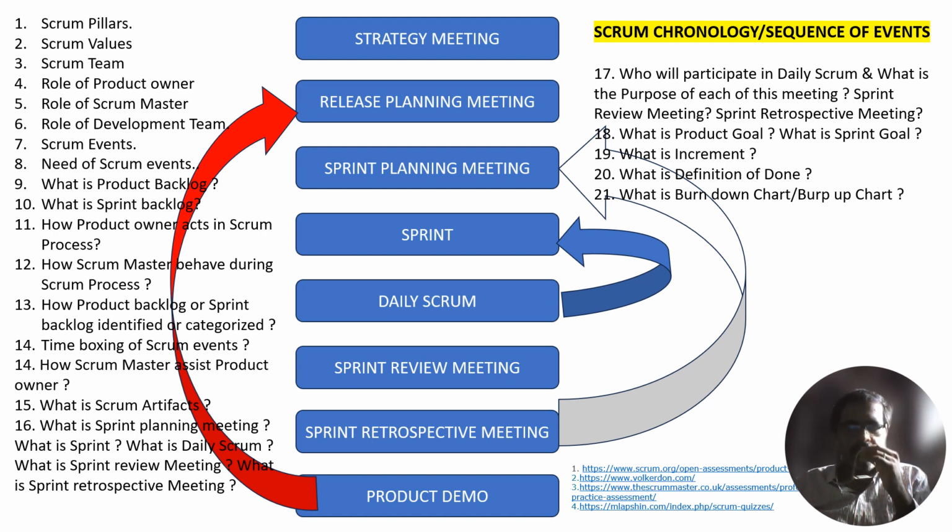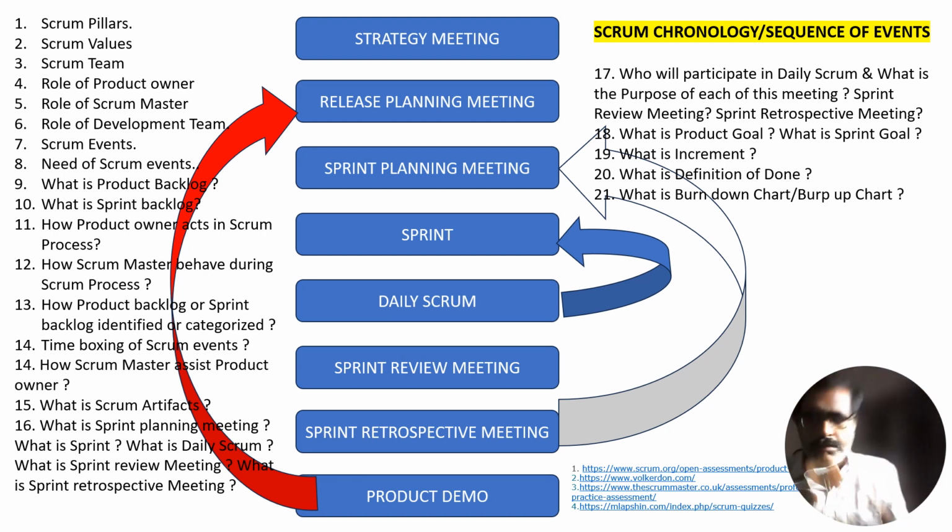The product backlog may also be adjusted to meet new opportunities. The sprint review is a working session and the Scrum team should avoid limiting it to a presentation. The sprint review is the second to last event of the sprint and is time boxed to a maximum of 4 hours for a 1 month sprint. For shorter sprints, the event is usually shorter.